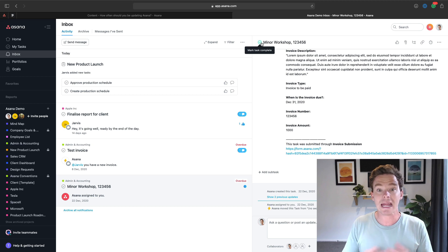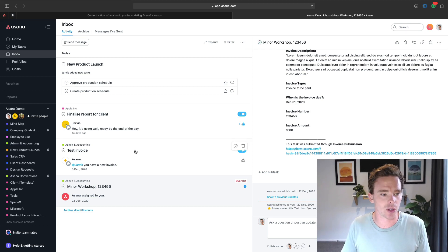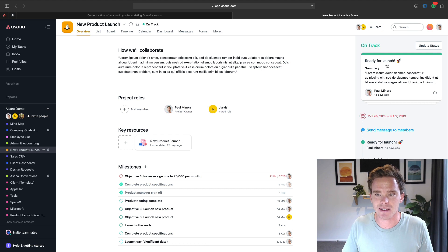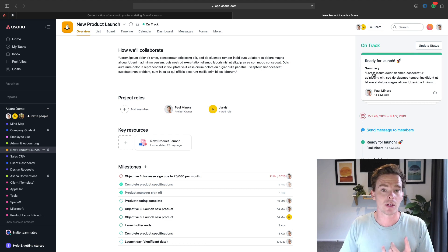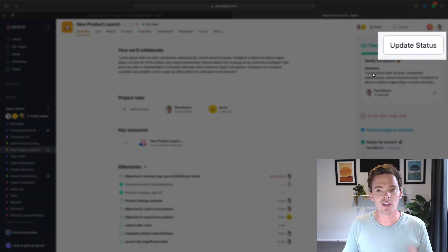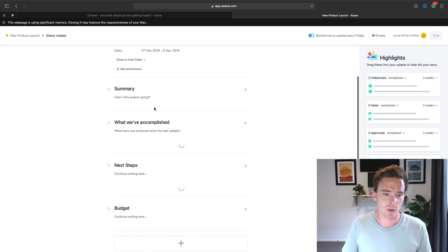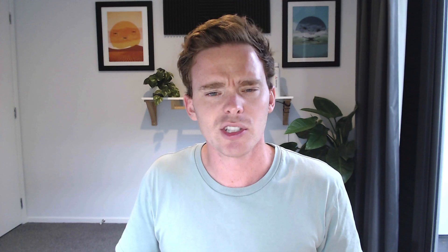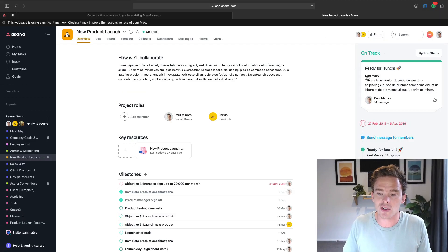Now let's talk about what you need to do on a weekly basis. Once a week, depending on the projects you're working on, you need to come to the overview tab of your various projects and update the status. This status update feature is a great way for the project owner to take an opportunity once a week to assess how the project is going. You can write a summary, think about what you've accomplished and what you need to do next, and even add custom sections. It's a really useful exercise for a project manager, and it's also useful to post these status updates to share with the team so everyone is up to date on the status of different projects.